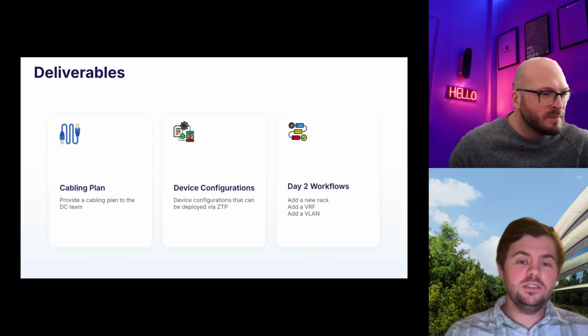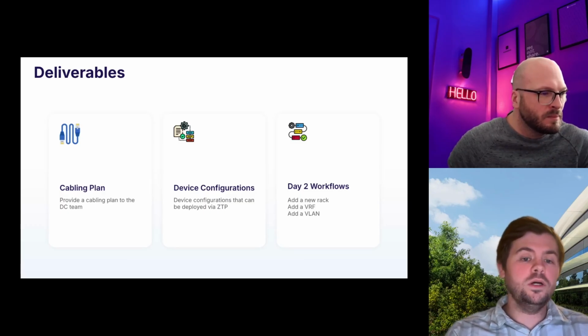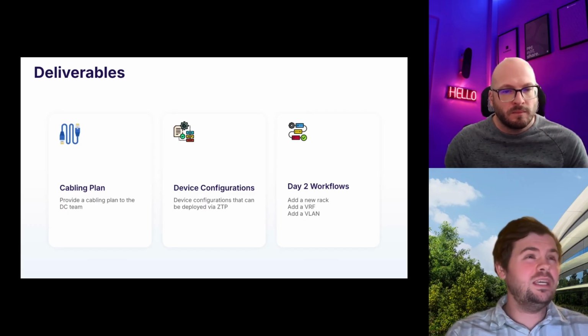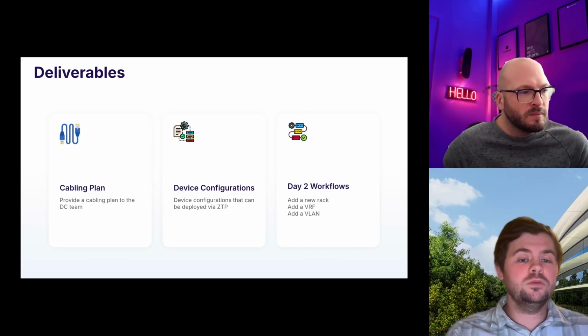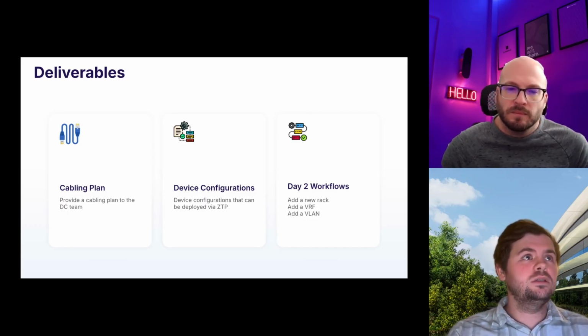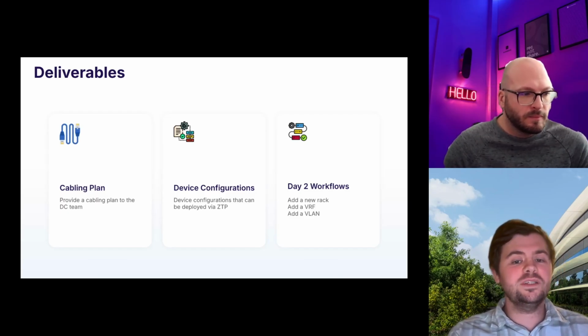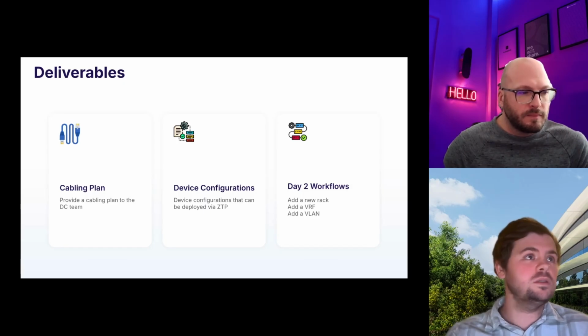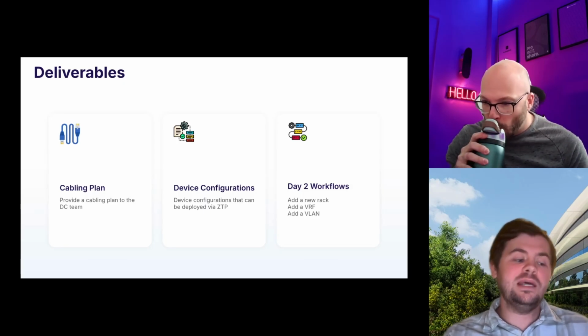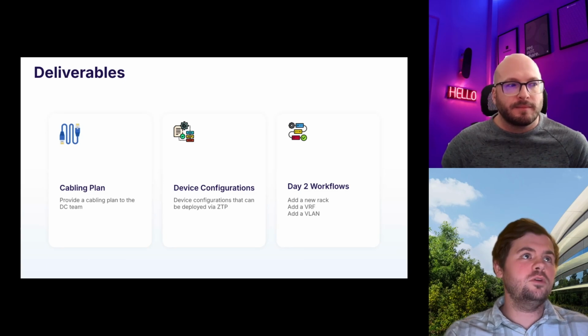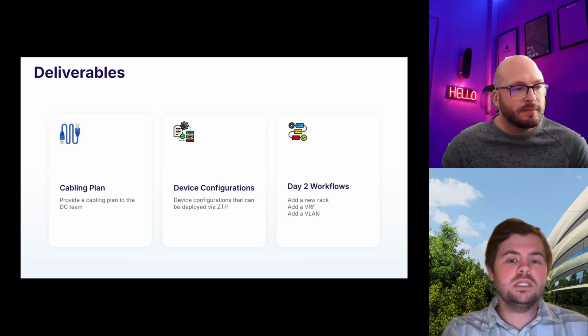So the engineers that are going to site to do all this layer one work need to know what they're plugging in and where. So a key part of Infrahub there was to generate the connections between all the devices so that this team had the right information about what is connecting where and what's required. So you can start then planning orders of cables based on the output of Infrahub. So you can be quite specific.